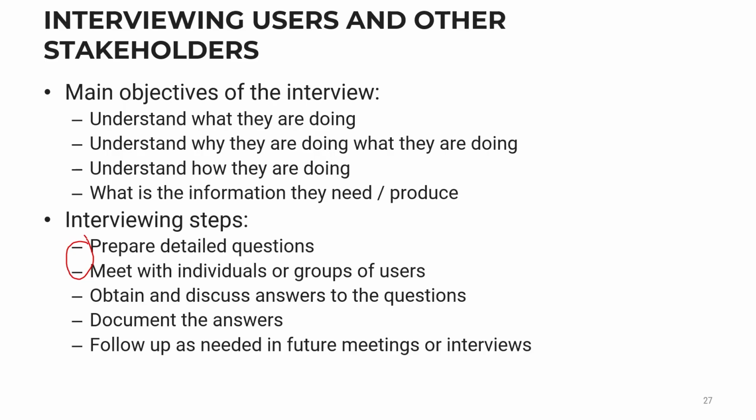First, we need to do some small homework, like, okay, today we're going to meet department A. What are the tasks? What kind of users do we expect to see in this department, like a doctor or staff? If this department is financial, we don't expect to see a doctor, but we expect to see an accountant, for example, and then we can prepare the questions accordingly.